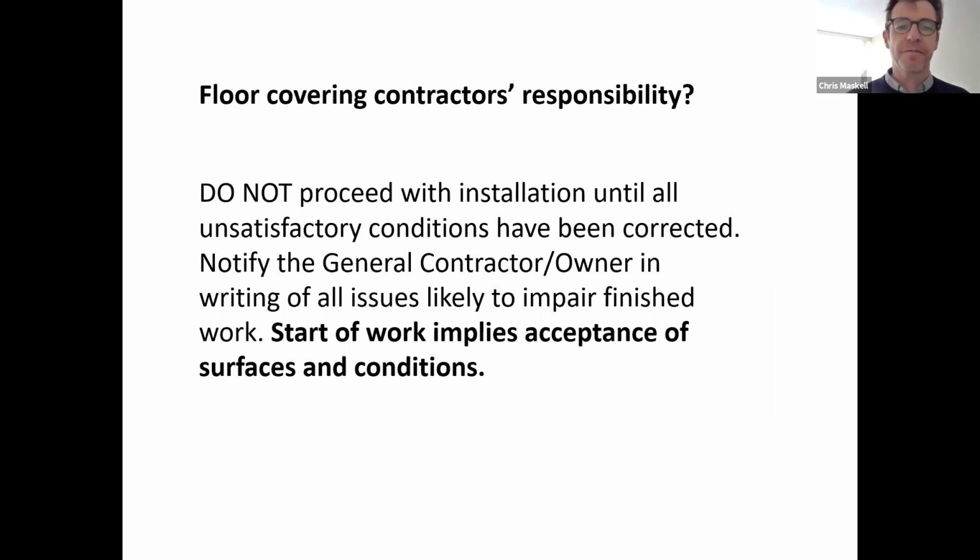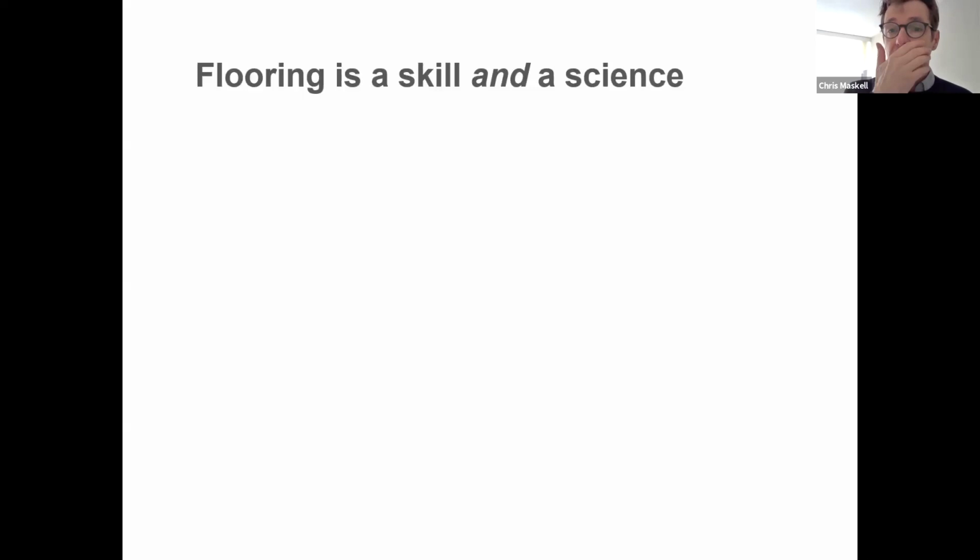Another big responsibility for us as floor coverers: do not proceed with installation when conditions are known to be not right. Start of work implies acceptance of service and conditions. You go to a restaurant, you eat the meal, you don't pay? You can't just eat it and not pay. It's important to stop the process and give the manufacturer a chance to come to site and speak to the product before you just install it and then expect someone to cover you if there's a problem.